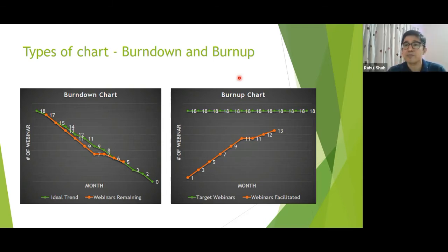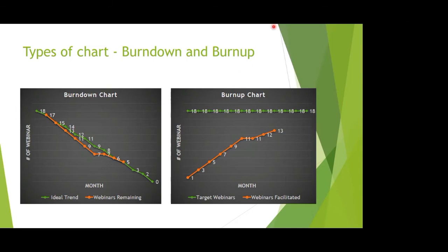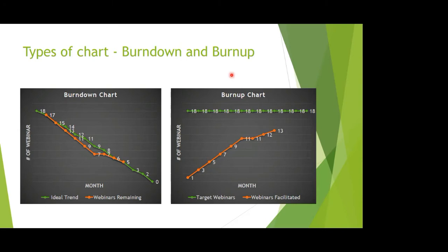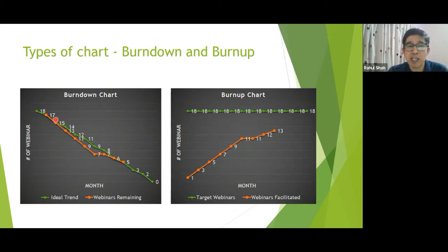Yeah, so like we talked about scope creep in the burndown chart, the actual trend does not show the effect of, let's say, an increase in scope. Will this be reflected in the ideal trend by any chance? I'm talking about the burndown chart. No, with the burndown chart, two things. The ideal trend will not change. It will remain as it is.